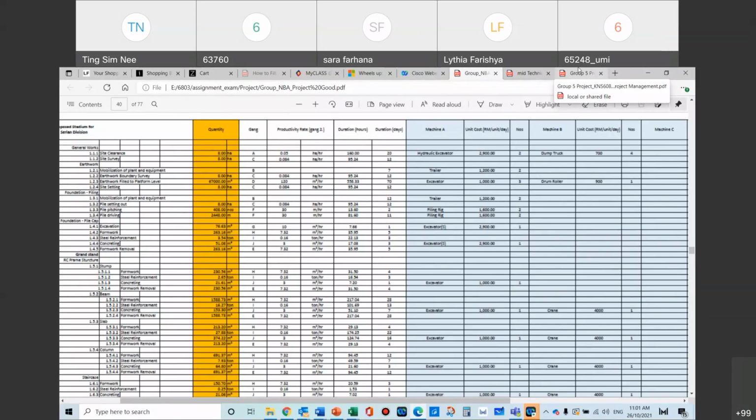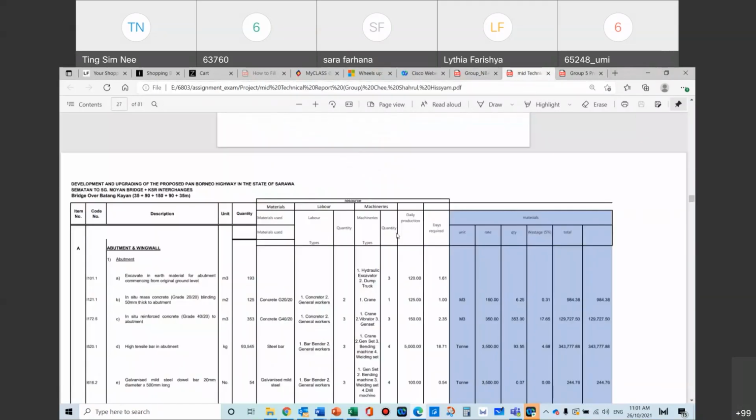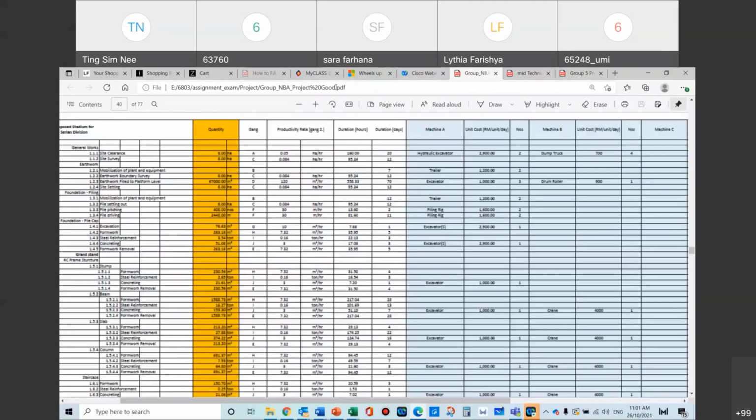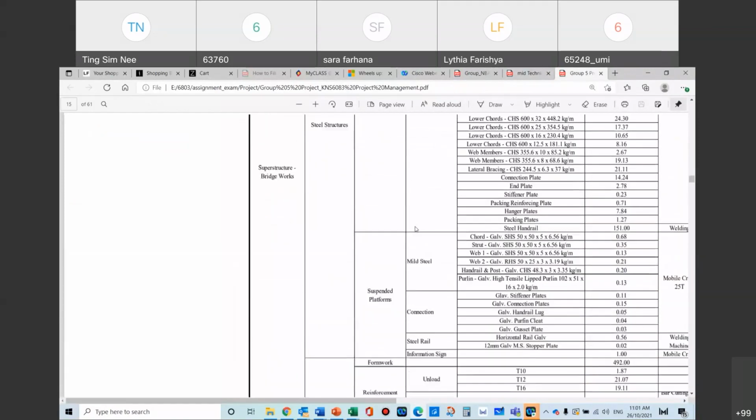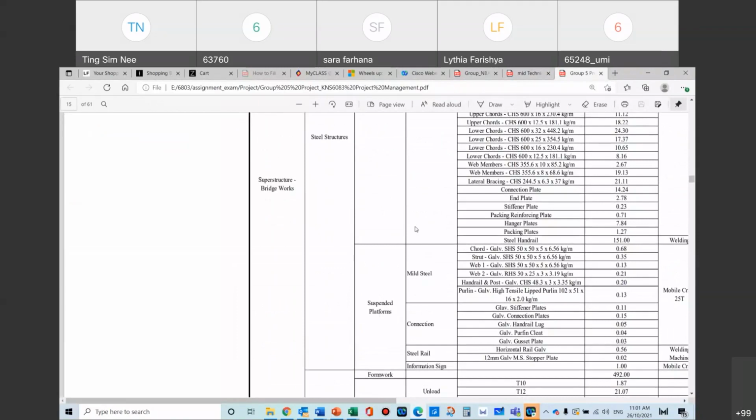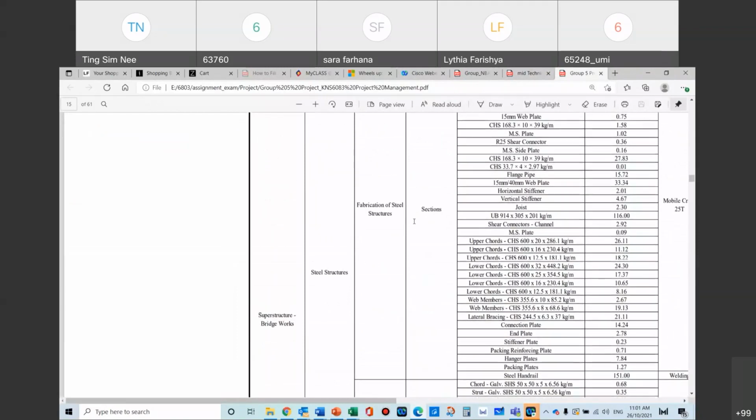No matter how many examples I show you here, it's only me talking. You can see, I show you, oh, this is layer one. You see these three groups, they go by different formats. You have one that goes by a one-layer, two-layer coding format. You've got one that goes 1.1, 1.2, 1.3, 1.2.1. And then you've got one group that goes by level 1, 2, 3, 4, that sort of format as well, you see. So it really depends on yourself, okay? It is all doable. It's a matter of how you project a story, how you tell the story of resources.